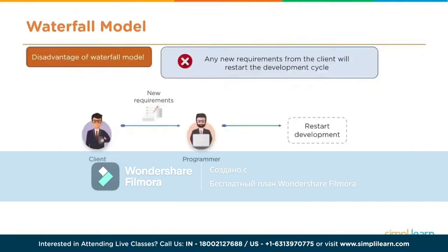The problem you have, though, is that there are some challenges, however, that you have with the waterfall model. The cascading deliveries and those complete and separated stage gates means that it's very difficult for any new requirements from the client to be integrated into the project. So if a client comes back and the project has been running for 6 months and they've gone, hey, we need to change something, that means that we have to almost restart the whole project. It's very expensive and it's very time consuming.